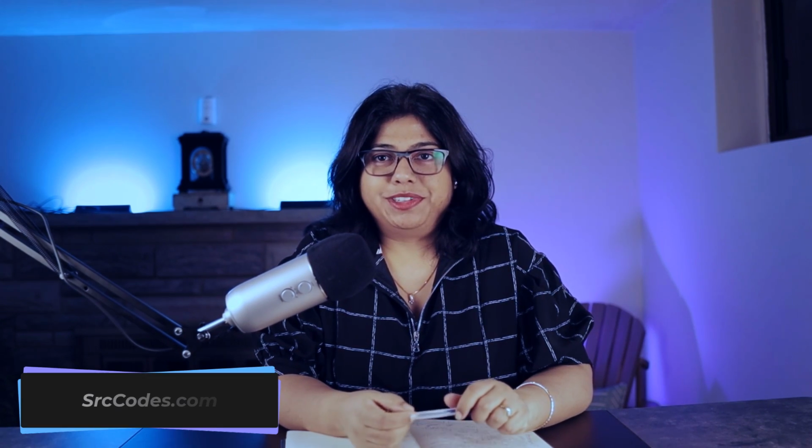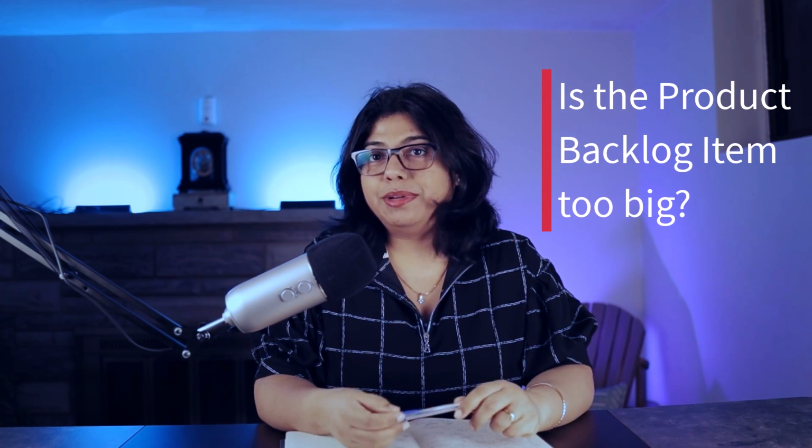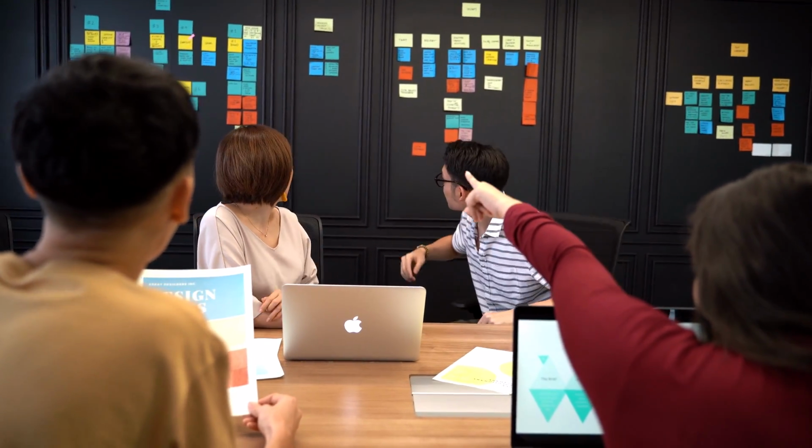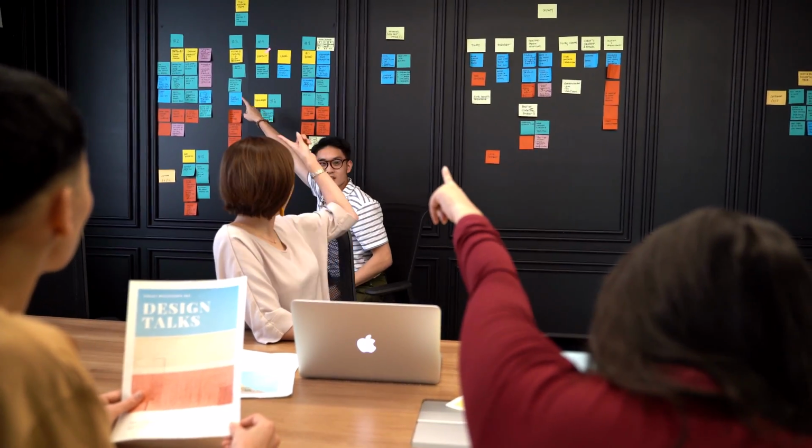As a product owner, I find knowing the user story size or the effort needed to convert the particular PBI item into an increment helps me perform better. Here's why. It is during the backlog refinement session that we try to take a go at the estimate, and right away I know if my user story is too big and if there is a need to break it down into multiple user stories, or I need to change the structure and make this particular item an epic that